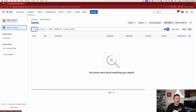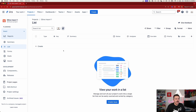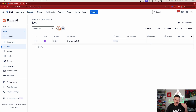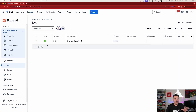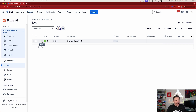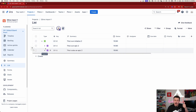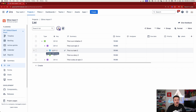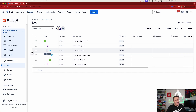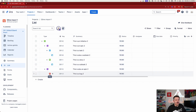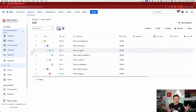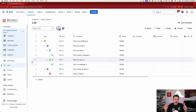We're back and we can go into our project. I'm going to go to the List view and all my issues are now in here — they do take a moment so give it a few seconds, it's not immediate. Click Refresh and you'll slowly start to see your issues show up. Now enough time has passed — this is my initiative, coming in from my Excel file. I can expand it and here are my two epics. Expanding the first epic shows my task and story, expanding the task shows the subtasks, and this one has the bug. The hierarchy is preserved, all relationships are intact.